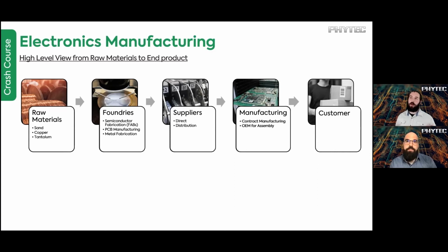And for that part, we get parts in and that takes, like you said, 26 to 30 weeks for those parts to get made and sent to us. And then it takes whatever time it takes for us to run those through manufacturing lines, put all the parts on the board, solder them all down and get those parts tested and then shipped off to customers. Exactly. So once we receive the parts, we then need to put them on our SOM or on the PCB, produce it, test it, and ship it to our customers, which could add another 4 to 10 weeks depending on the design and the complexity, and also if any issues occur along the road.